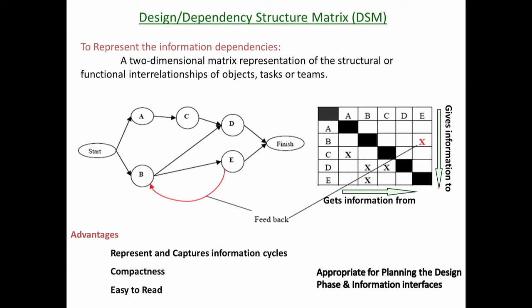I now move on to an area which is not so much applied in practice but is a very interesting area called the dependency structure matrix, or DSM — also referred to as the design structure matrix. Its primary utilization is for design management, more than construction management; it is used in the design phase. The key reason is that CPM cannot take feedback loops — if E depends on B, B cannot depend on E again. But design is an iterative process, not a one-time process. There will be iteration and information exchanges between design elements.